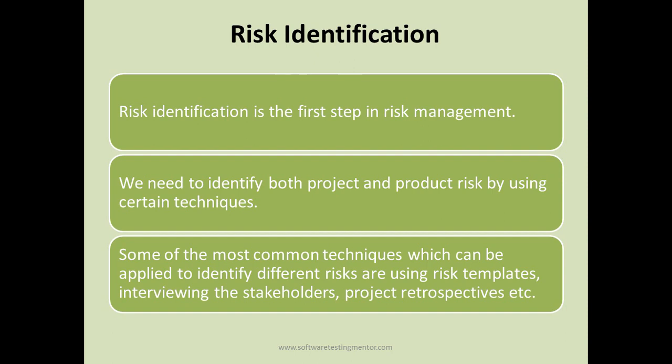in the project. So in the risk identification, you should have a template first with all the major functional and non-functional risk factors that you want to discuss, and then with interviewing, with one-on-one sessions, you can figure out different risks and identify different risks in the project or product.